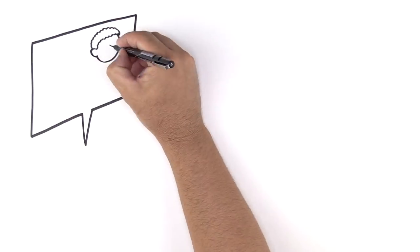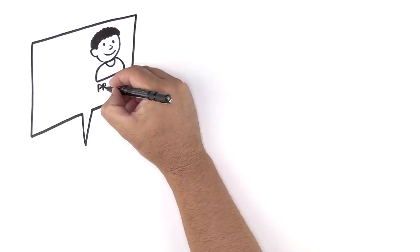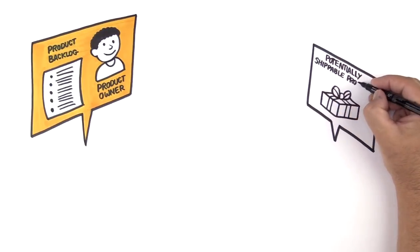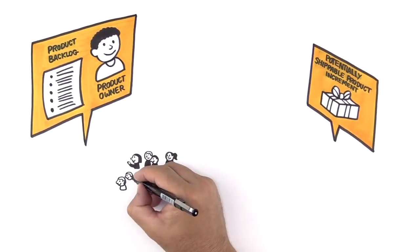LeSS is multi-team Scrum. There's one product owner providing vision and one adjustable prioritized list of customer-centric items: the product backlog. We want one integrated shippable product increment every sprint—every one to four weeks. Multiple teams develop this product, one shared sprint at a time.